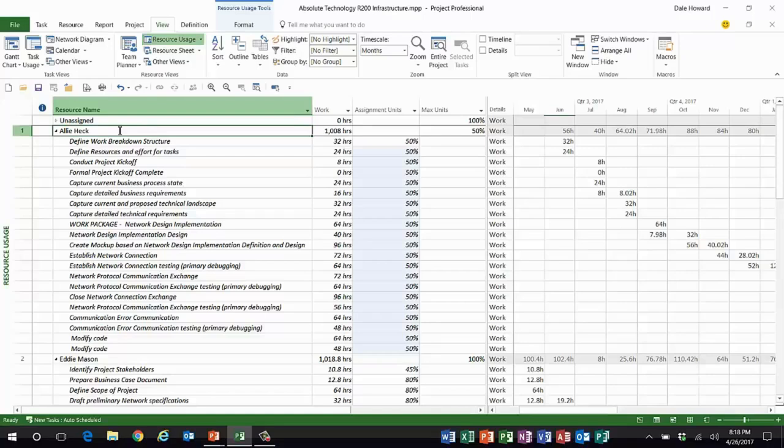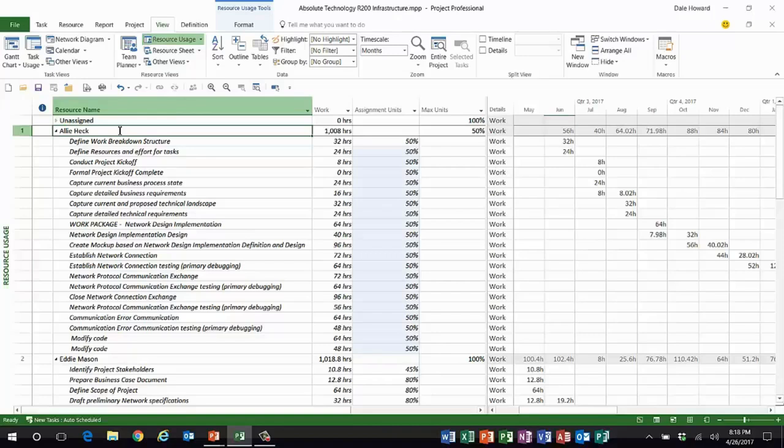The only negative consequence is in Microsoft Project, because all of my tasks are fixed units tasks, Microsoft Project is going to recalculate the duration of everything that Allie's working on. Her work amounts are going to stay the same. No change there.